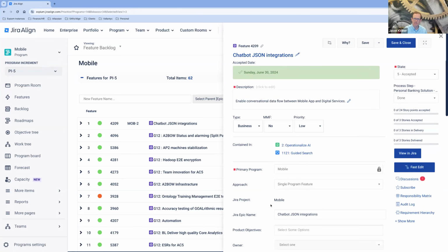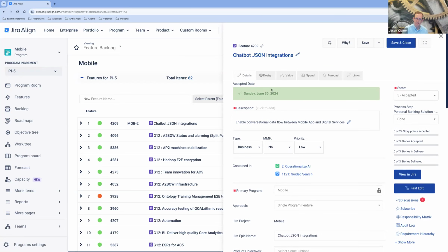This is, as you can see here, the layer of Jira Align that would start to sync over to Jira. So this is set up to a Jira project. And there's various ways to do this, but this is really the first layer of work items in Jira Align that you can sync with the Jira connector. And those would become Jira Epics. You can rename those to features now in cloud or in data center. So those would sync over as Jira Epics or Jira features. And so this is where you start to unlock the connection point to Jira.